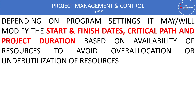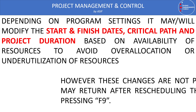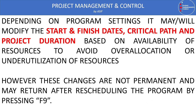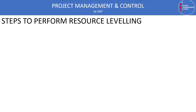We use this resource leveling technique to avoid over-allocation or under-utilization of resources. Keep in mind that when resource leveling is applied, the dates that change are temporary — it's a 'what-if' scenario. If the schedule is time-constrained, you can revert back by pressing F9 to reschedule the project again.